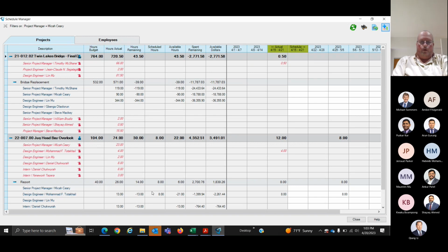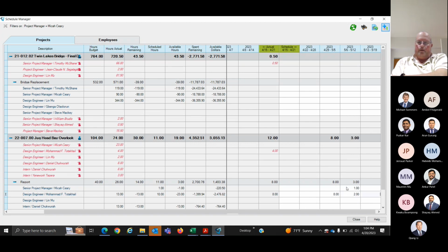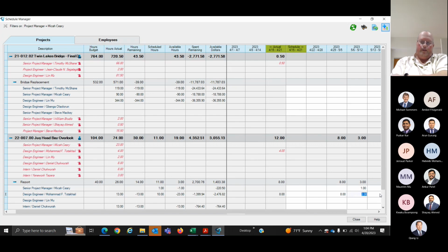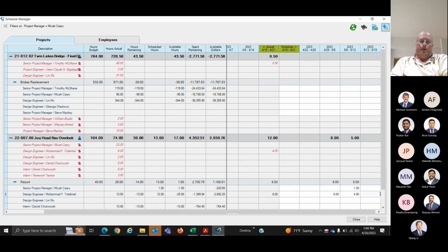So let's go down to report, okay? I have 26 budgeted, I've got 14 remaining, I've got 8 scheduled, I still have hours available. So you start plugging in schedule, let me put an hour in for me, because I gotta check it, and then all of a sudden, boom, that goes down. Let's say Fossil's gotta revise it, then it goes down again. And you can watch in real terms, like I have it in there for 2. If I take this to 4, my availability goes down to less than $1,200.